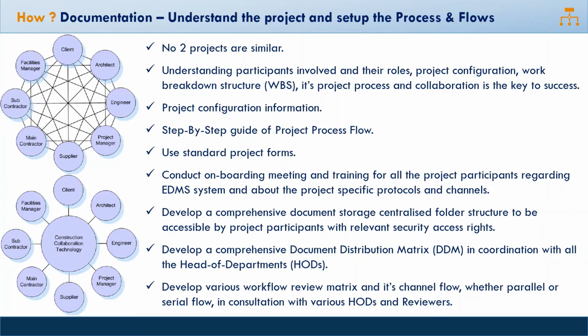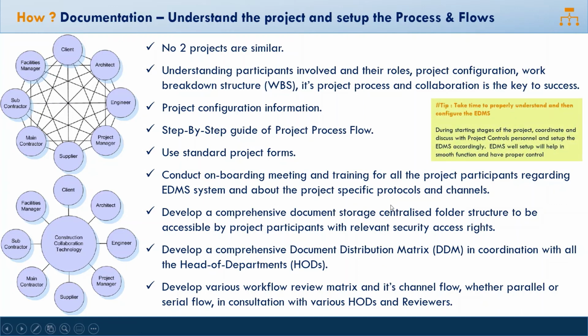Whether it would be a parallel workflow or a serial workflow, we'll see what a parallel and serial workflow is in the forthcoming slide. This has to be developed in consultation with various heads of the departments, whether it is the design department, structural consultant, or the in-house MEP department. You have to consult the head of the department and the reviewers and formulate various workflow channels based on their requirements. Then only can you transmit any submittal or document for their review and approval.